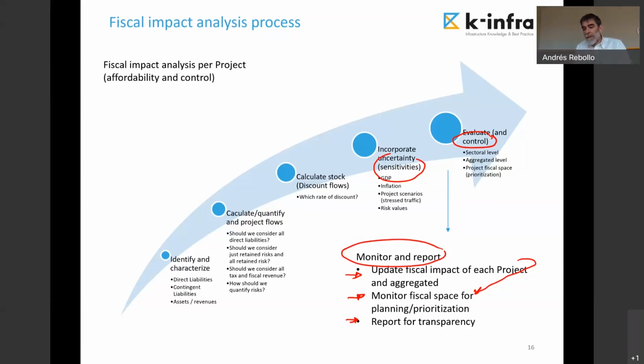It could be possible. But the most common is to reschedule the project. I should see in the projections of the fiscal space, and maybe in 2-year time, there is a space and I can accommodate the procurement of the project in 2 years' time, because according to the projections of the GDP and the projections of the portfolio, there will be sufficient space in 2 years, and so on. Okay, so I can reschedule, or I can revisit the scope of the project, or I can restructure the project, or I can abandon the project.